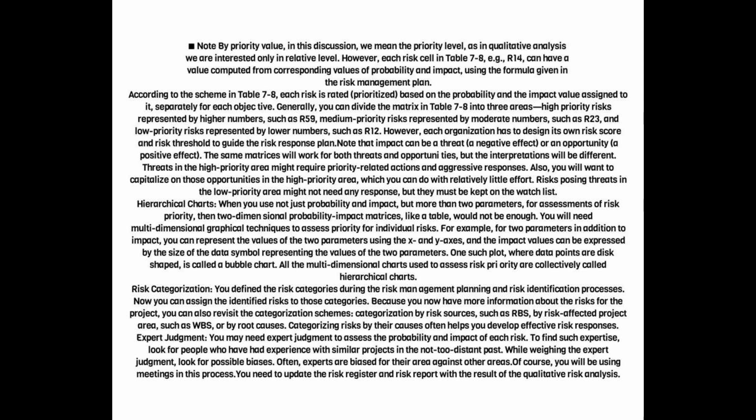The same matrices will work for both threats and opportunities, but the interpretations will be different. Threats in the high priority area might require priority-related actions and aggressive responses. Also, you will want to capitalize on those opportunities in the high priority area, which you can do with relatively little effort. Risks posing threats in the low priority area might not need any response, but they must be kept on the watch list.